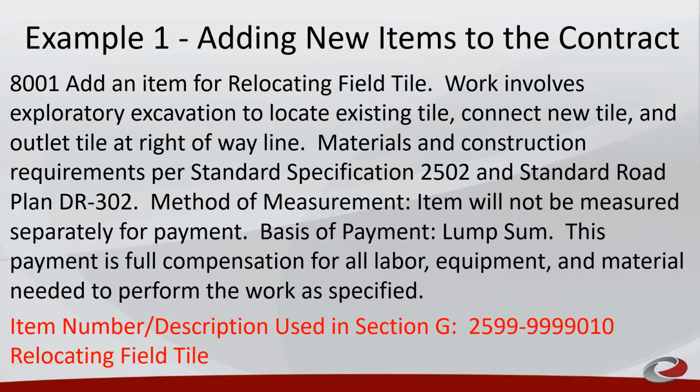Materials and construction requirements per standard specification 2502 and standard road plan DR-302. Method of measurement. Item will not be measured separately for payment. Basis of payment. Lump sum. This payment is full compensation for all labor, equipment, and material needed to perform the work as specified.